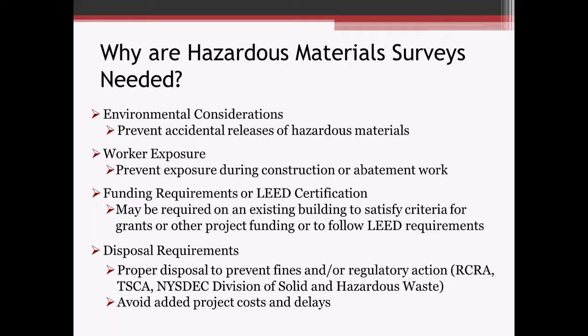And then disposal requirements. The last thing you want to do is, once you get done with the project and demo things, take it to a facility where it's not allowed to be disposed of. So proper disposal to prevent fines and regulatory action. You want to make sure you assess those items up front, because if you do it on the back end, you could have some delays and added project costs that you don't want to really deal with. And at that point, the cat's out of the bag, and it's hard to not deal with it at that point and pay the extra money for it.